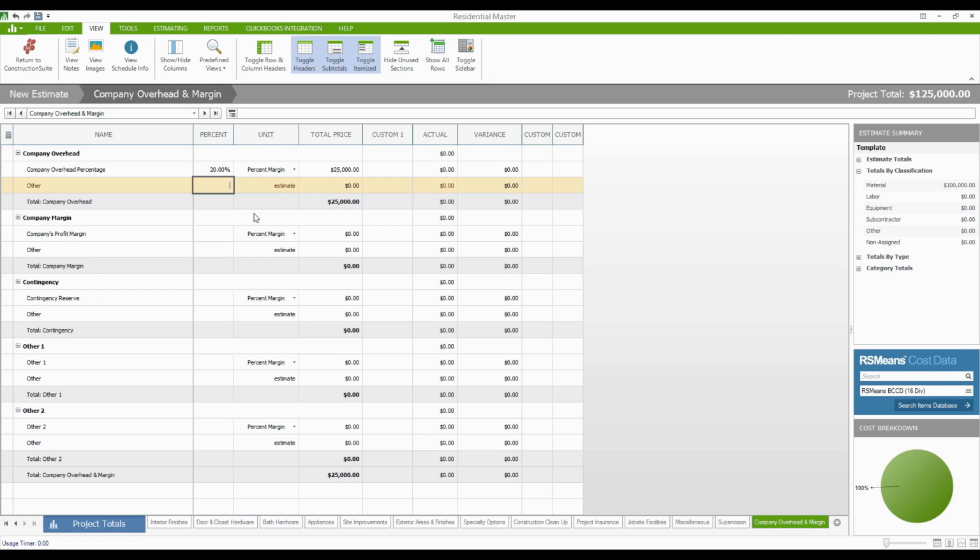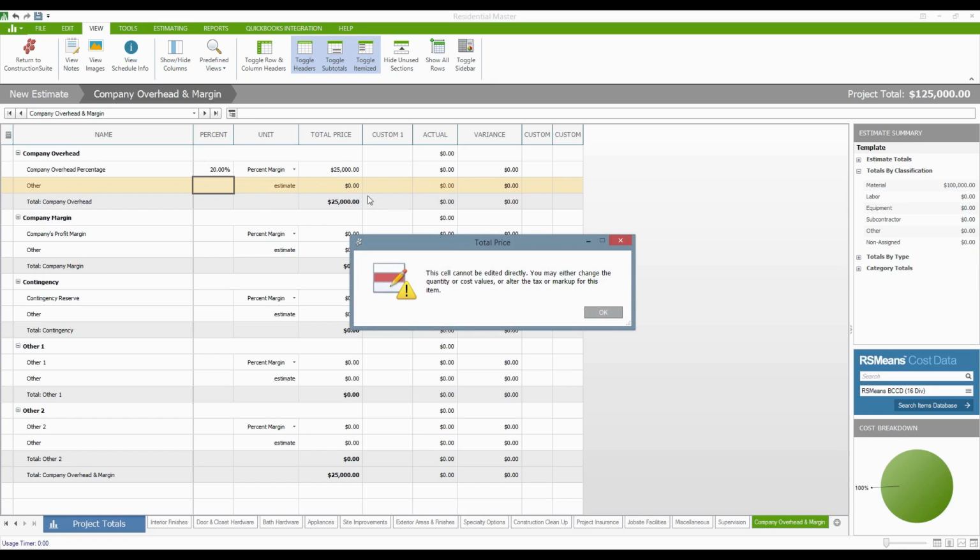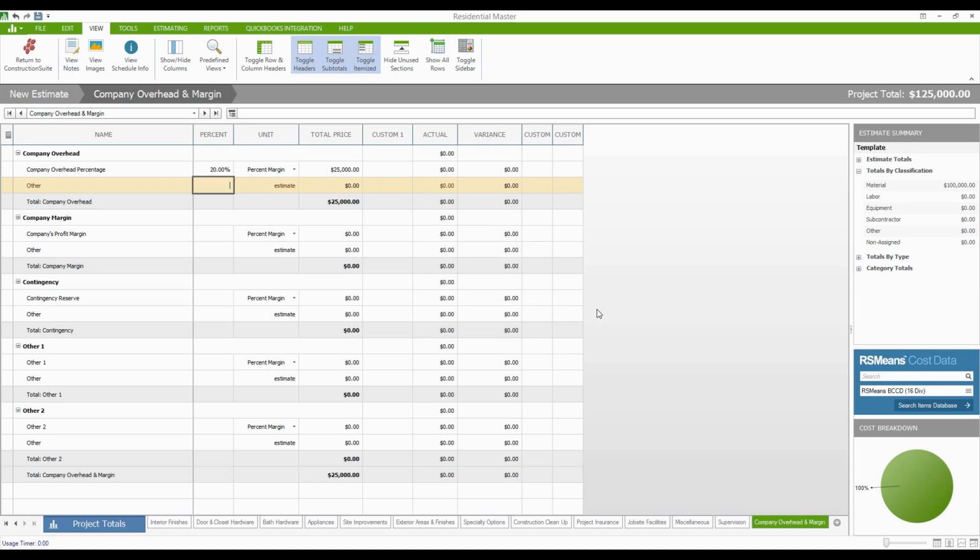And the reason that this works is $100,000 plus 25% gives you $125,000. That's percent of costs. But $125,000, if you take 20% away from that, you're taking $25,000 and you're left with the other 80%, which is $100,000, and that's your contract value. The $25,000 is your 20% margin. So same dollar amount, two different calculations.